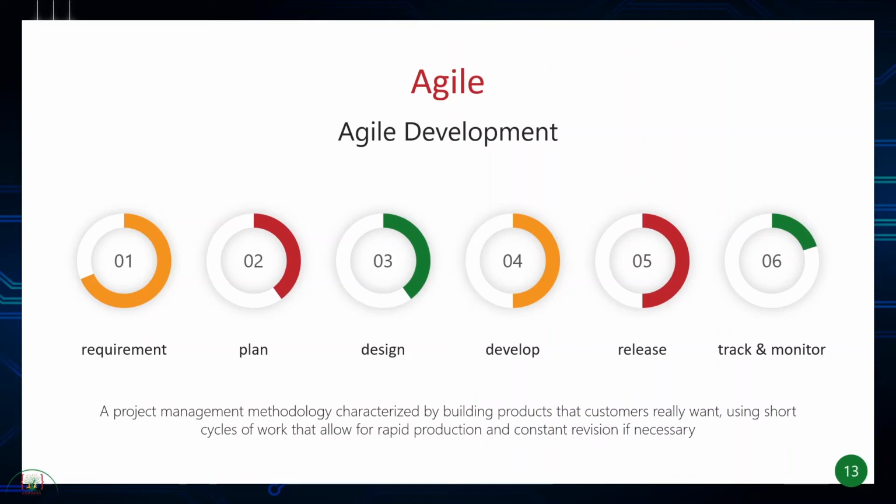So, definitely things can change during the project, but the advantage of Agile is that you're giving yourself a shorter window to change things. So, you're not wasting as many resources or as much time to actually show your finished product to your stakeholders. Usually an iteration will be 2 to 4 weeks, right? So within a month, you have shown your product to your stakeholder. You know if you're on the right track. He wanted a Mona Lisa. Are you giving him a Mona Lisa? Are you giving him a Starry Night? So within a month you get that feedback. You can make the changes. Problem solved, if I might say. So it's a shorter window, right?